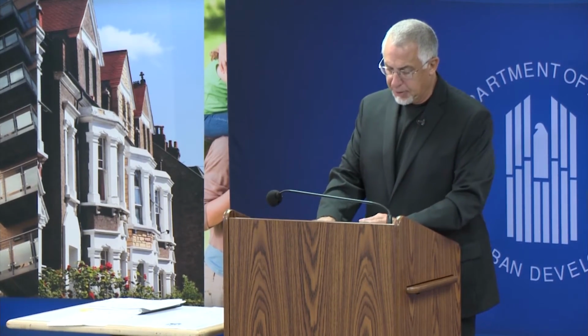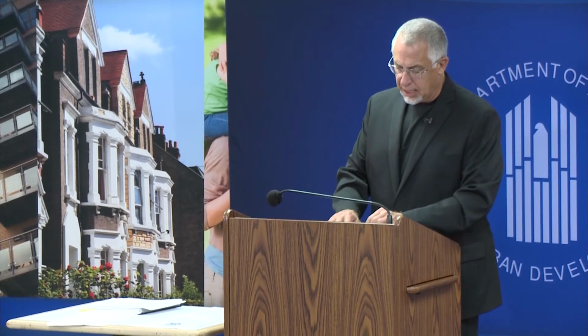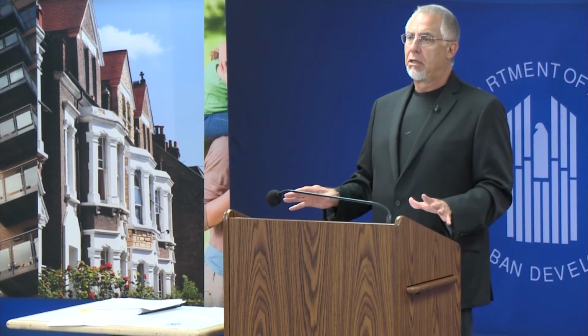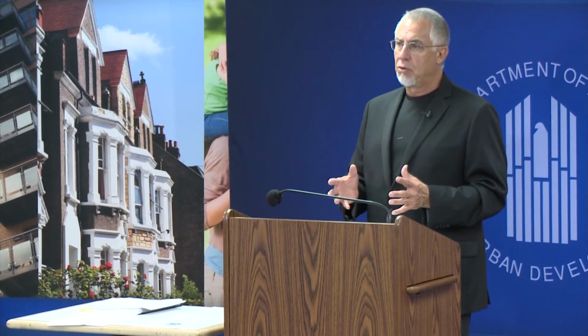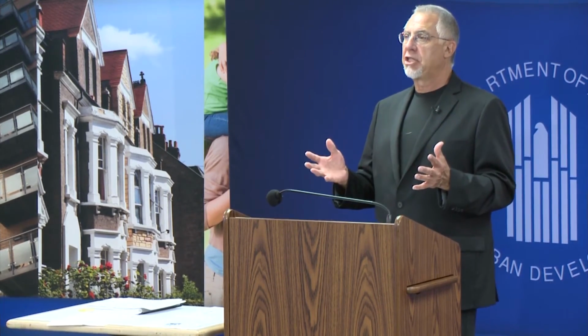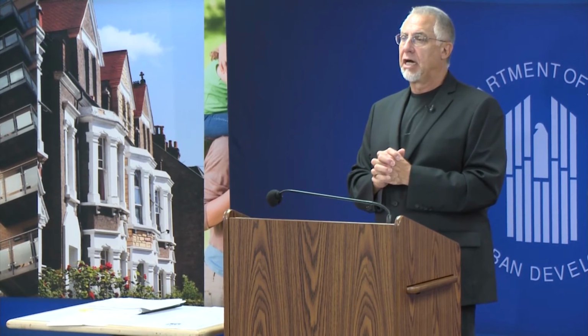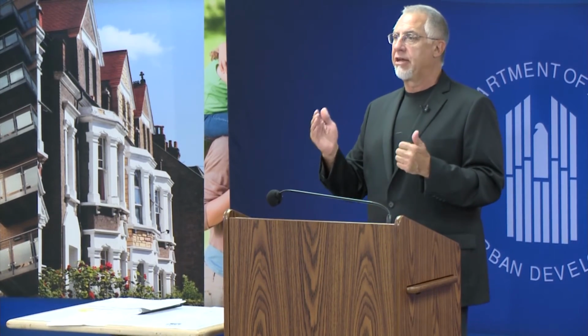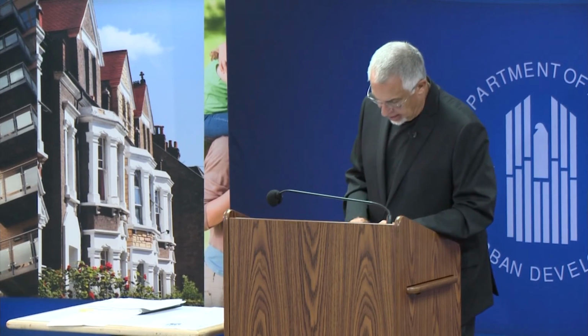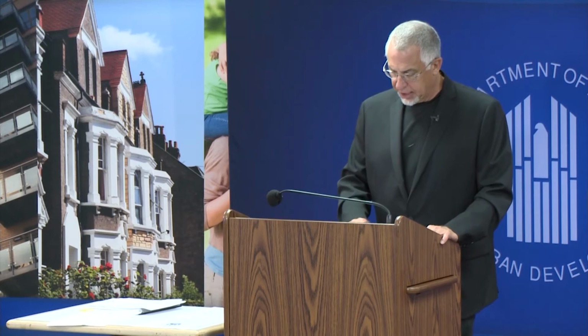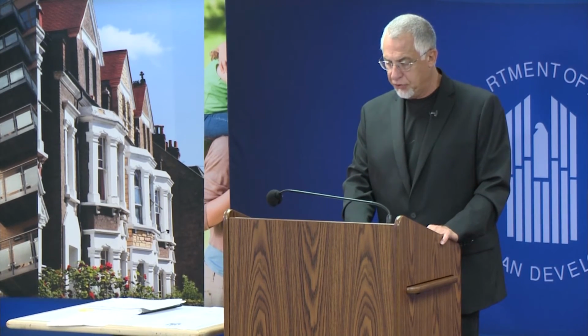So that's something to keep in mind, is the issue of competition. Competition has the effect of determining the market value. When you don't have competition, you have to take other measures to ensure that you're getting a reasonable price. And that information is found under 200.323B.